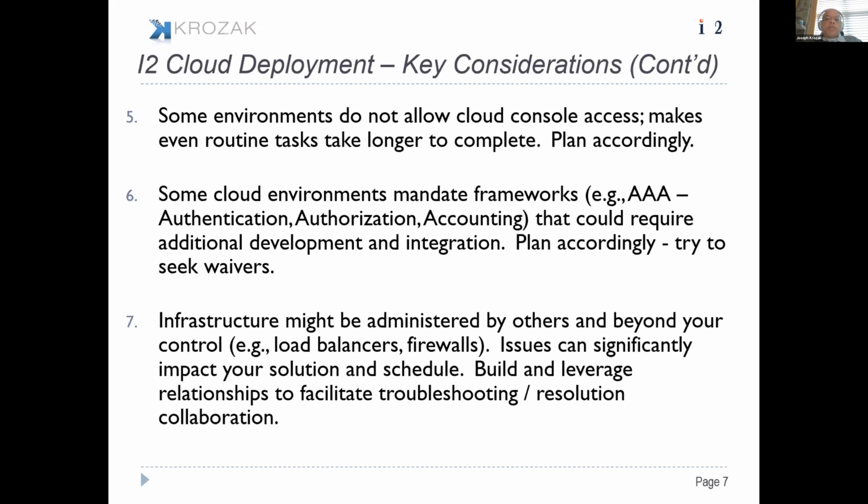And so that'll require some additional development and integration of the components that make up the EIA solution to use those environments. Sometimes you can get a waiver, so certainly try to seek that if it's the kind of thing where you can't absorb the schedule or the technical time or effort to do those integrations. But it's definitely something you want to know about upfront, depending on the environment you're going into, and be able to plan accordingly.